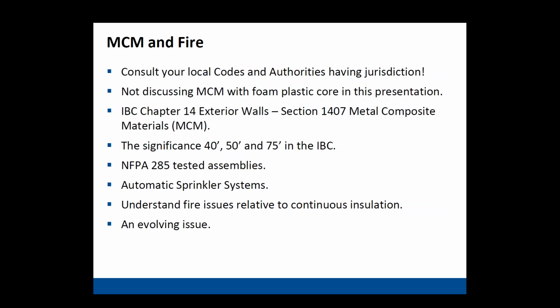That sort of thing. I would think the fabricator, because they deal with all the sheet manufacturers. So they know the limitations, say Larson sizes aren't quite the same as Alpolic. A lot of these fabricators, like Zeke pointed out, bid the different materials against each other to get the best value for the project. And they'll be able to tell you that your panel size is limited to this manufacturer or this group of manufacturers, because this one doesn't fit that criteria.